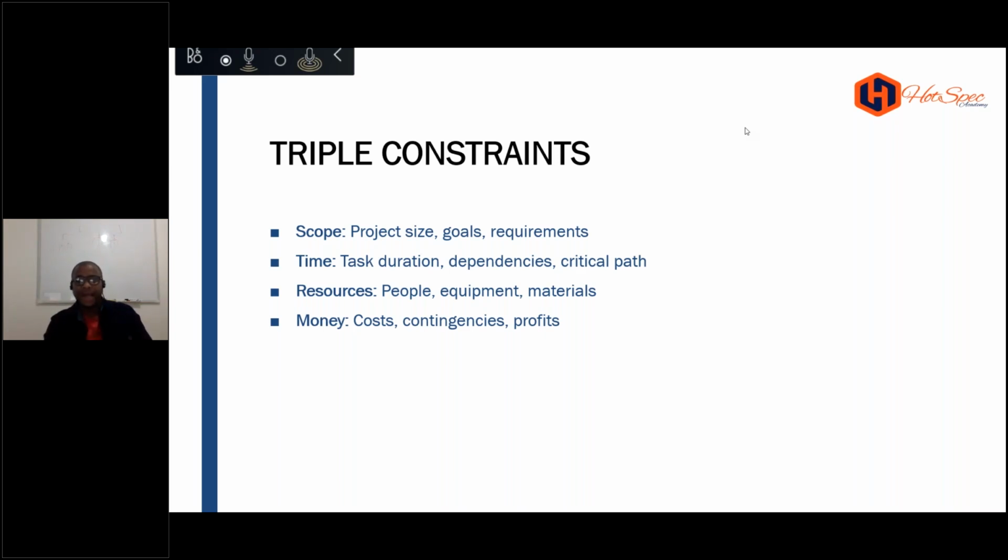So estimation is done initially at the beginning of the project. You're going to estimate. How do you estimate? Do you do it yourself? No. Subject matter experts, they do the estimation. Just like when you're running Agile, every sprint package is estimated. And with time, organizations can start to have a standard, that okay, that task can be done in 3 weeks. Why? Because they've been doing similar tasks over and over again.